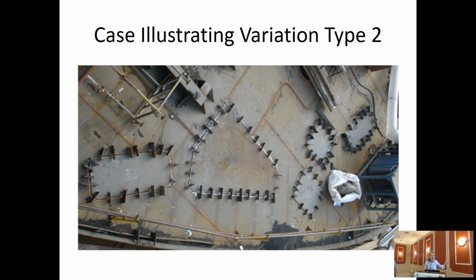This picture illustrates the deck of a vessel where scope outfitting equipment is to be installed. As you can see here, the fixed place of the equipment is specified. The common approach in the industry is to build equipment foundations into the steel structure of the block units with a specific space for the equipment. This is a good solution from a design perspective, but with costly loopbacks on a large number of ready, finished documents when scope outfitting changes come late in the process. So how can we do it better? Can we plan it differently to eliminate this waste, which is actually quite large?